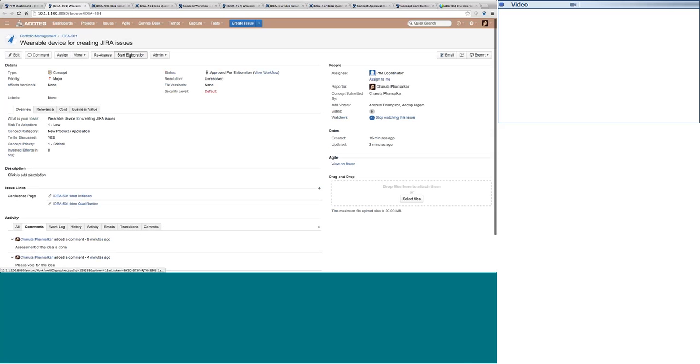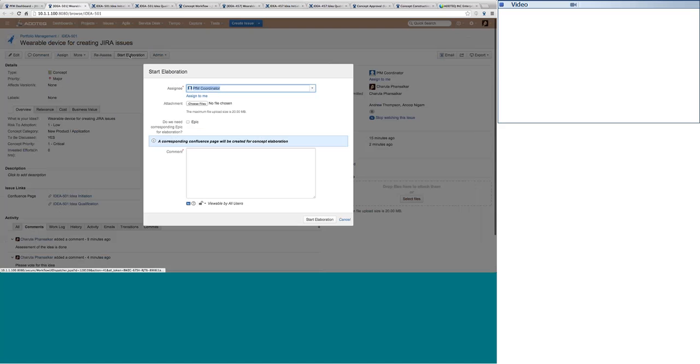Now, as far as the variable device for creating the issues is concerned, that was just an idea that we started with. But if we think from the technical perspective, maybe I'm not very sure how that is going to shape up. So in this case, any organization would feel that we should have a technical POC or proof of concept or a technical prototype developed to just build the confidence of the organization or the technical team. Now, when we are using Jira, we are talking in terms of epics and stories. So we would be doing the entire chunk of work under the epic. So the entire technical POC or the technical prototype will be carried out under an epic and it can be monitored very well through the epic.